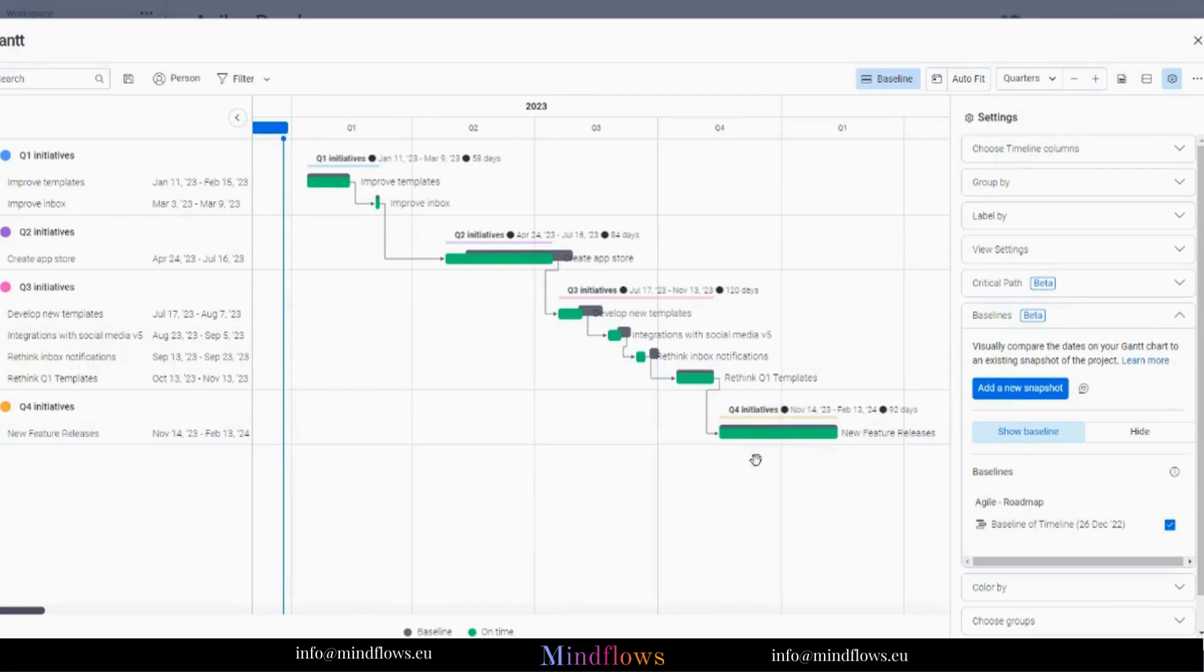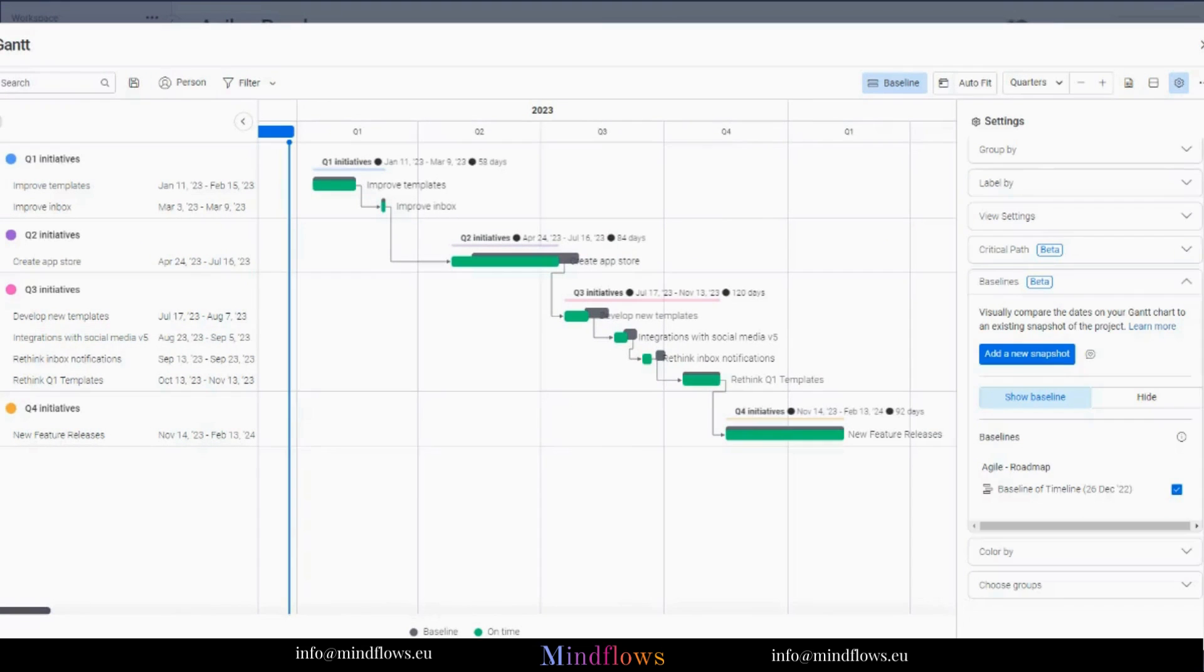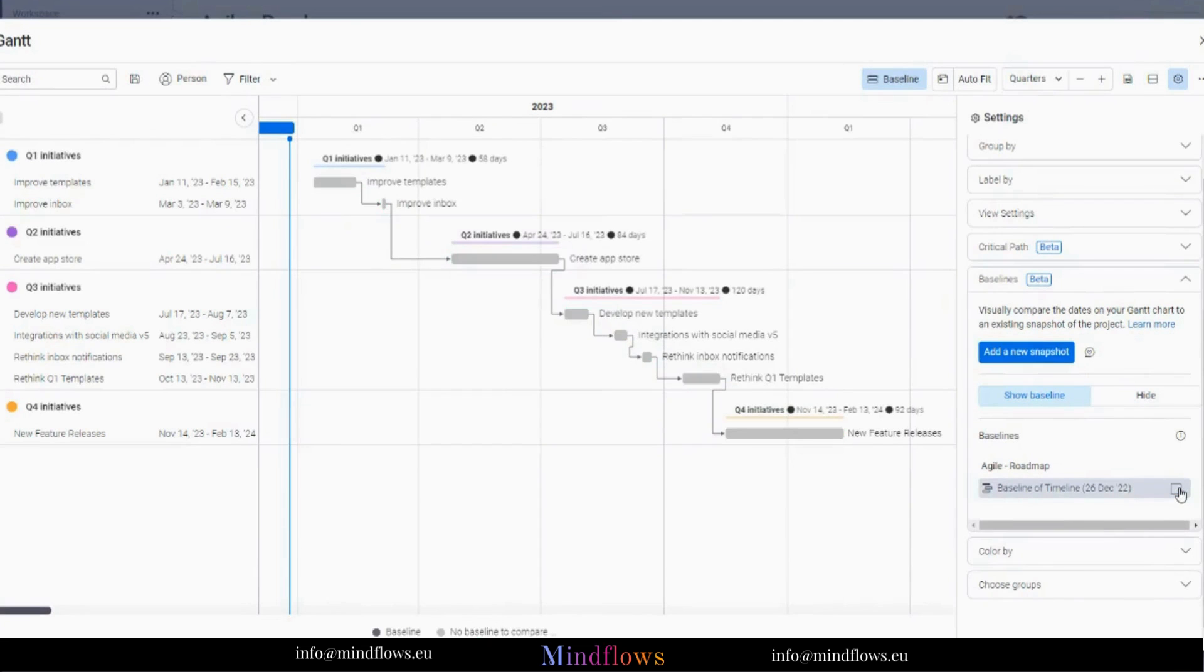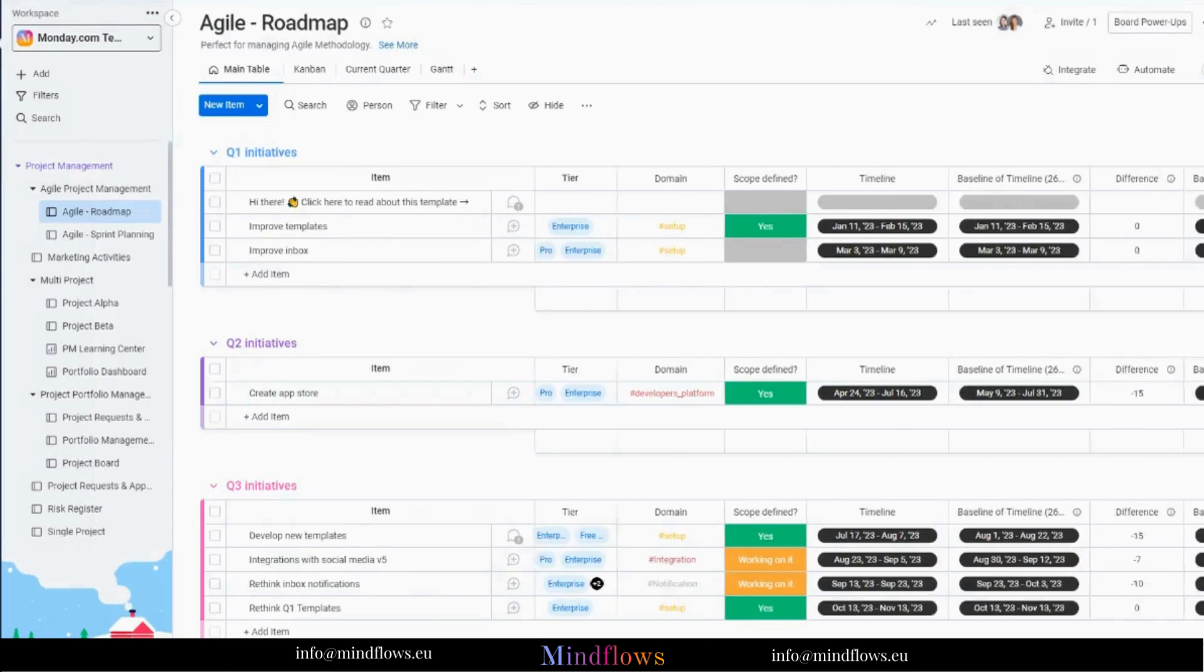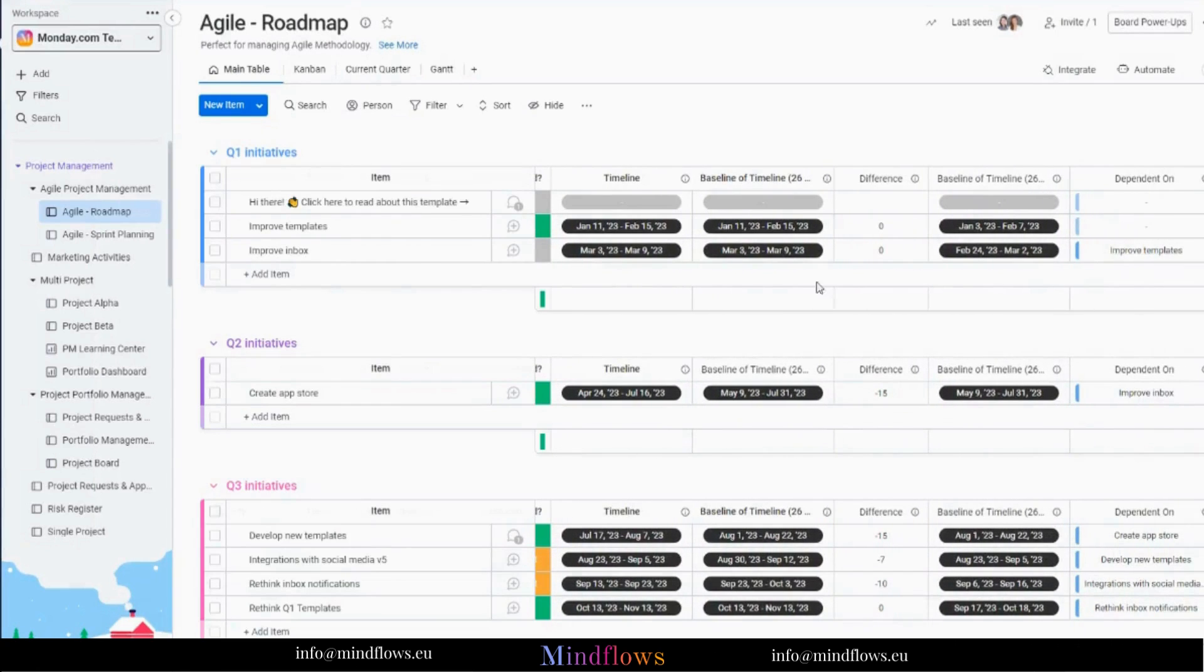The baseline section of Settings is also where a list of all your existing baselines are located. Every time a snapshot is taken, a secondary timeline and a formula column will be added to our board automatically. The secondary timeline displays the project plan as of the snapshot, and the formula column displays the number of days that have passed since your original plan.